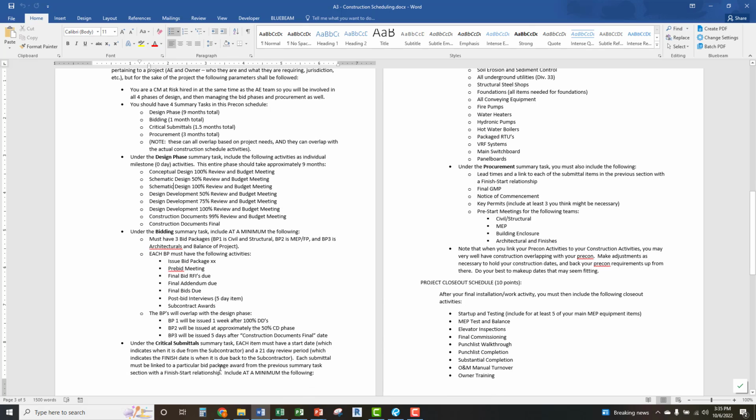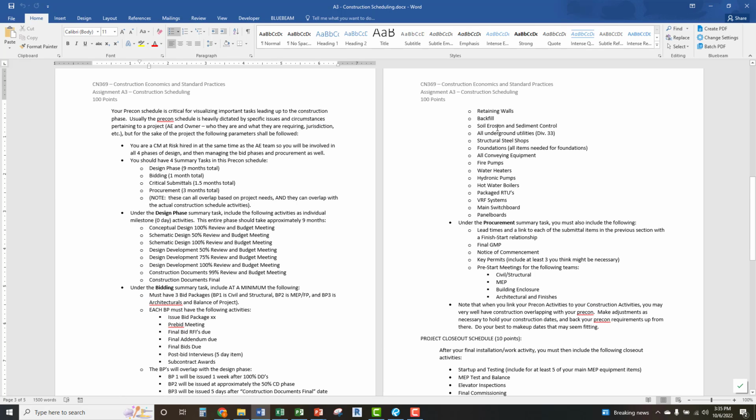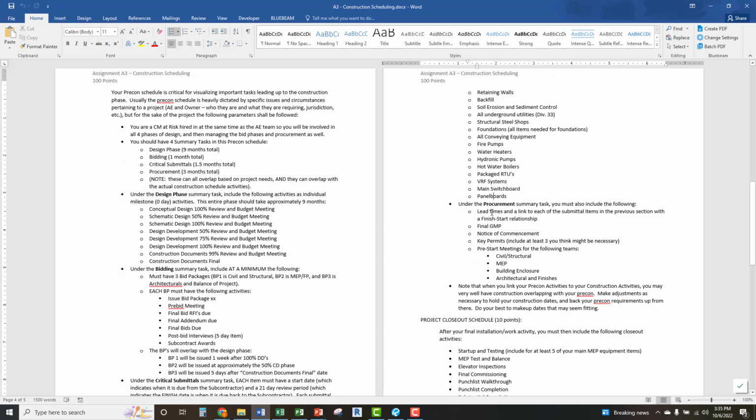Is very likely. Your critical submittals, I just listed several items that you have to include on your project. Under procurement, you need to have lead times for each of these items under your submittals. We're going to have to have final GMP date, notice of commencement date, your key permits. We're obviously going to have a couple that have to be involved, but I'll let you guys take a look and make sure you can see what kind of other permits you might need for a project like this. And then having pre-start meetings for all of these project teams.